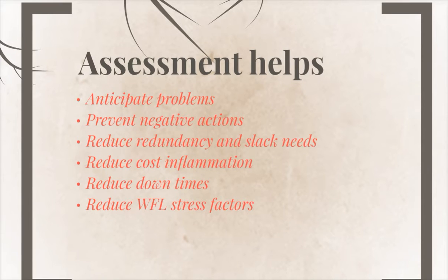Assessments help in many different ways. One, they obviously anticipate problems that are going to come down the line. Maybe it's a workforce problem. Maybe you're entering into snow season and your organization is in the north, in New Hampshire or Vermont, where snow comes in a quick fall for 6 to 7 months. You might have a workforce stoppage because they can't physically get to work in January, and knowing this, you have to assess that problem.